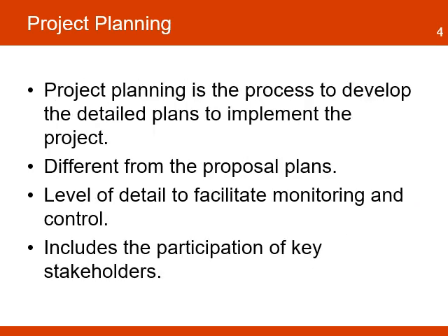In this phase, the project manager and the project team will develop the detailed plans. They differ from the plans included in the proposal. The proposal plans are usually less detailed but define the general scope of the project. The detailed plans are more focused on planning the implementation activities in a level of detail that will facilitate the monitoring and control of the project. An important characteristic of this phase is the participation of key stakeholders. They may include partners, representatives of the beneficiaries, and other actors that will be involved in the project.